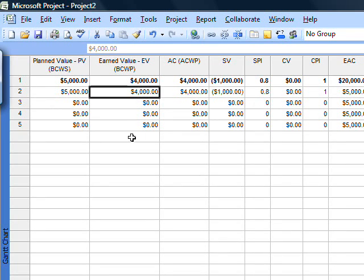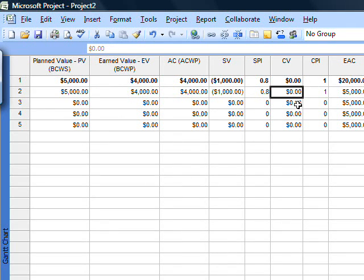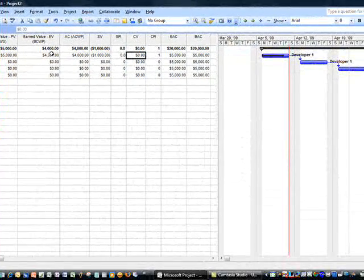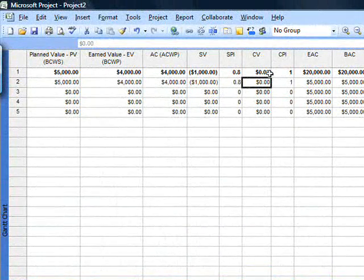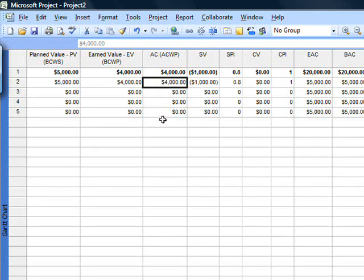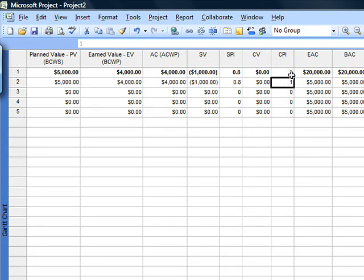The schedule performance index is earned value divided by planned value. Cost variance is zero because my actual costs equal my earned value costs — they're the same. The reason they would change is if I were to have to pay some licensing costs, material costs, or some resource juggling on tasks — things that would affect my cost after I had baselined it. If those vary, that is revealed in the actual cost of work performed, and subsequently in the cost variance and the cost performance index.